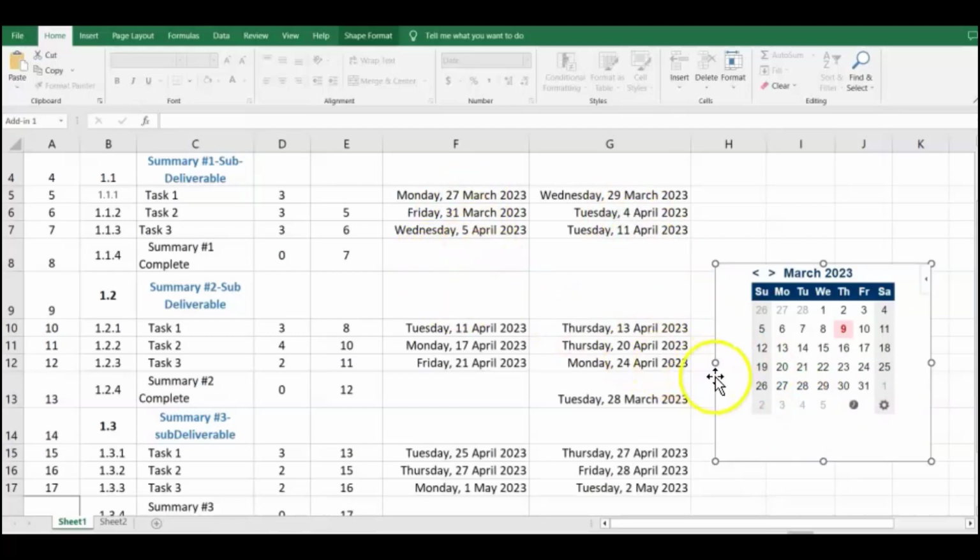Now we come on to the 5th of April, they have a start date on the 5th of April, so let's go to April. It's starting on Wednesday the 5th, and it says it's ending on the 11th and it's 3 days. So why is it going to take so long? So you have the 5th of April, and then you have the 6th is one day, but 7th is Good Friday. So that one counts. And then you have the weekend, and then the 10th is Easter Monday, so that one counts. So you're going to have the 6th, the 11th, and the 12th.